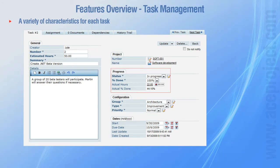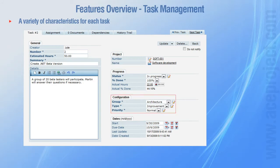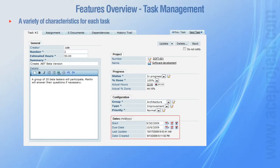Its progress is defined by updating the status and percentage done. You can also group tasks with the help of task groups, task types, and task priorities. Finally, define a date range for completing the task by entering a start and a due date.